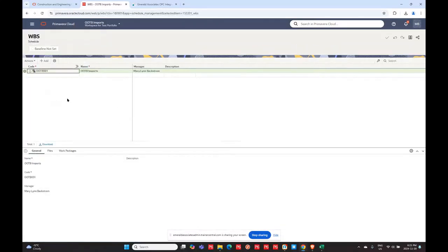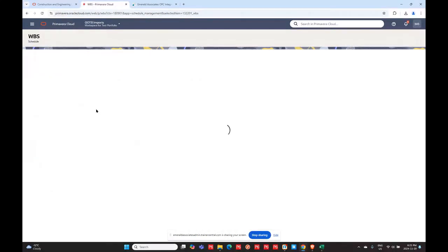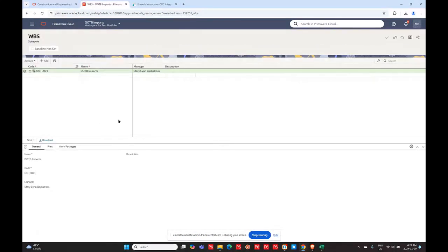So to do those imports, Marilyn, you've got to do them each one after the other. They're all separated, right? Yes. Okay. So that's going to be a big difference with our tool. You can do them all in one sheet, one pull. Definitely, you have to pull the WBS and then push the WBS in. You have to go to the activities, pull it, push it. And that's the same thing even when you get to export, import of scope or work packages. They're each by themselves. Okay, thanks. So we'll come back and have a look at this. It should be finished a little bit later.